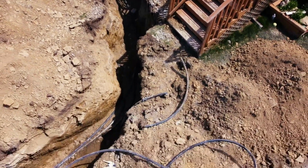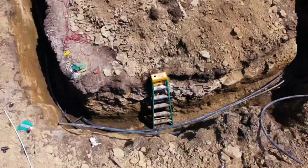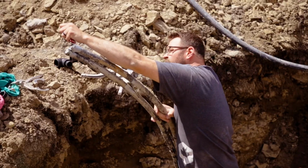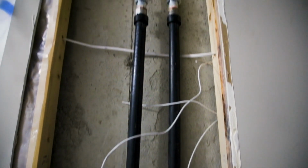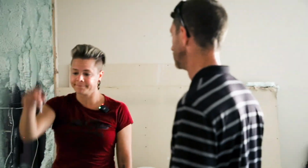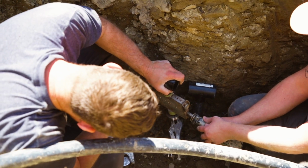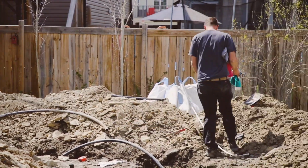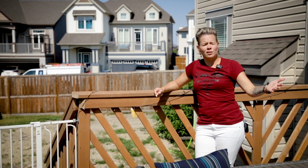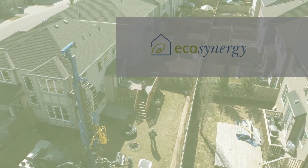The next step will be a small header trench to ultimately connect our boreholes in a manifold type fashion outside, and we run a supply and return line into the house and then ultimately into your mechanical room, and we pressure test everything. And once we know that the pressure test is good and there are no leaks anywhere, then that trench can be backfilled, and really that field will never need any form of addressing. It's very doable. So this was just the geo piece.